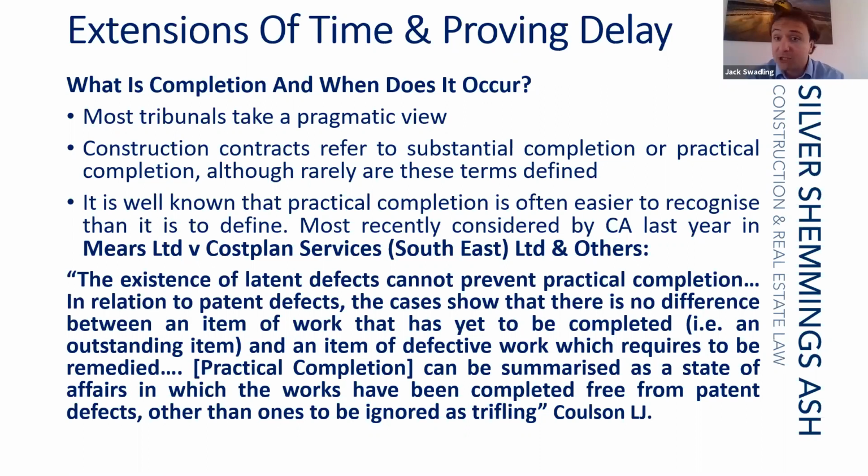But the certification of practical completion is of huge significance to the contractor and the employer, not least for insurance purposes, for the release of the first moiety of retention, for the passing of risk from the contractor for the site to the employer, and for the levying of liquidated damages. Now, when does practical completion occur? This is often an area of dispute.